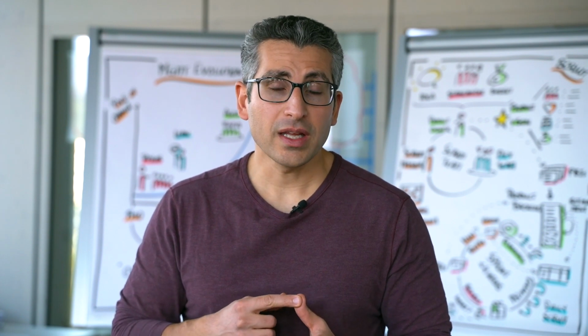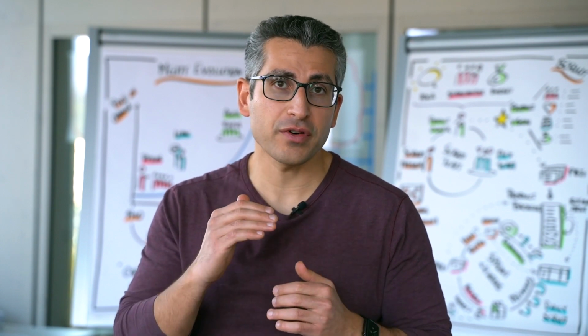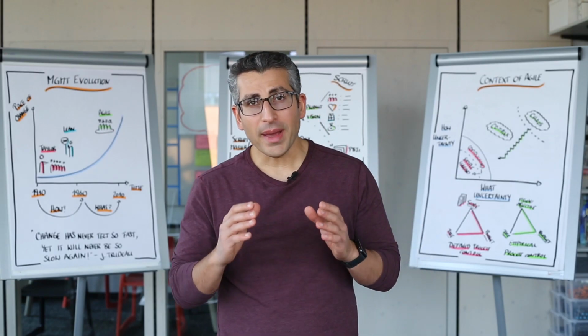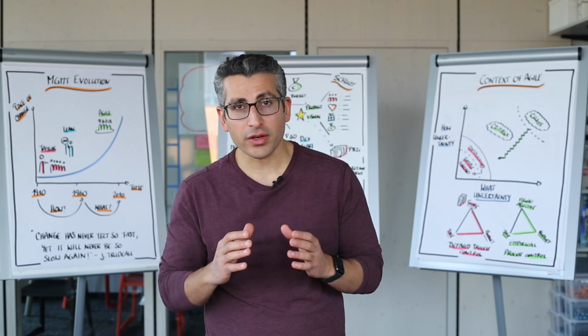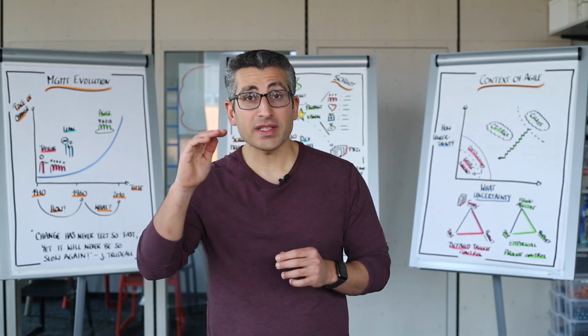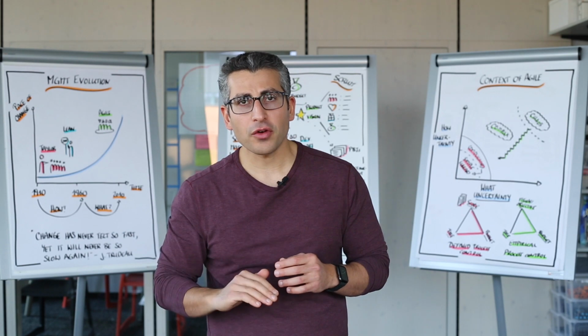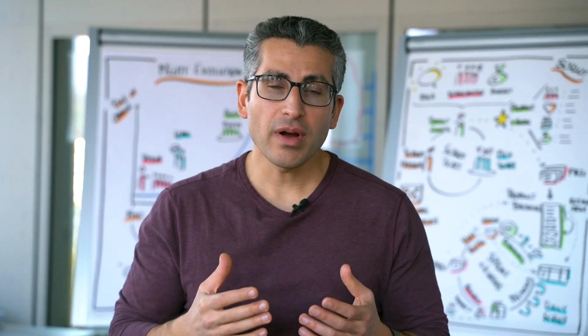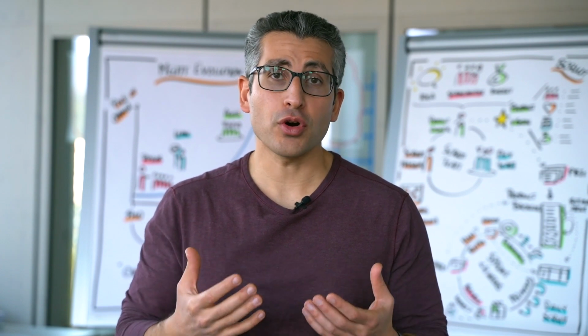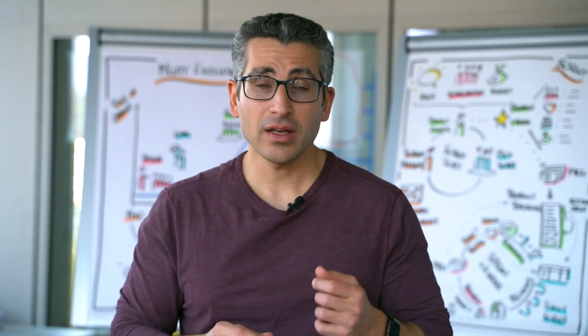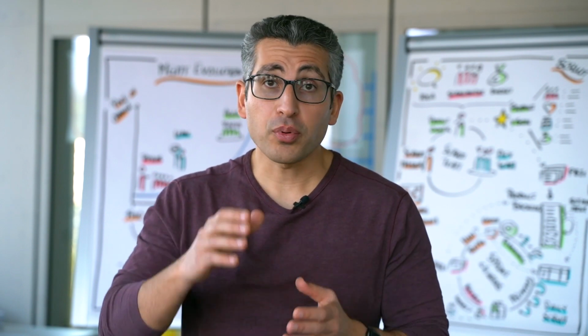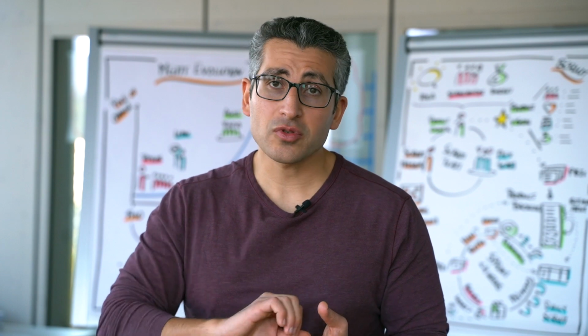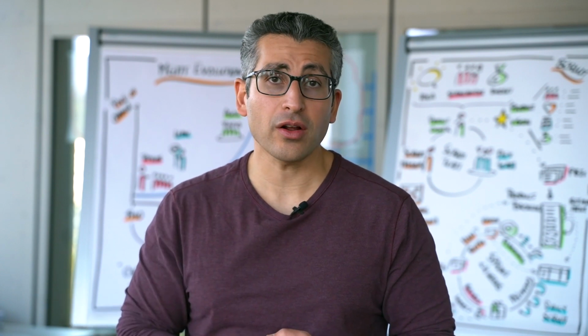Number one would be that there is a clear order, a clear priority for every single item in that backlog. Based on that order, based on that priority, we would detail the ones at the top and leave the ones further down a bit more broad, cloudy. Also, every product backlog is emergent, which means that it's a living document. New items come in, other items go up, the priority changes, and some items we just delete and don't work on at all.